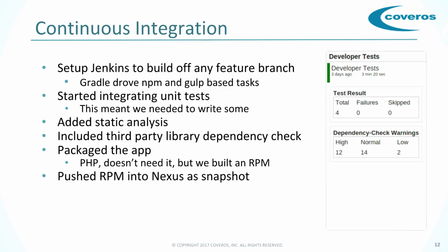So in order to make sure that we could actually do some of that refactoring, instead of just going out and saying we're going to dedicate a whole sprint to writing unit tests, we said every time you touch a piece of legacy code, make sure that you refactor it a bit and try to actually write some unit tests. We weren't perfect when we were doing this, but by the end we did have, I think, several hundred unit tests just from the fact that every time we touched some code, we started writing some tests.